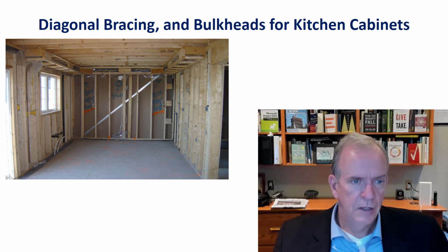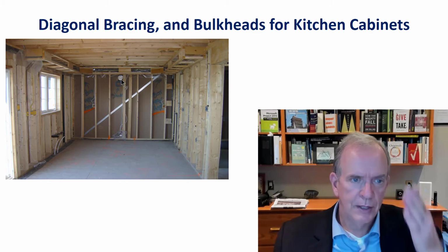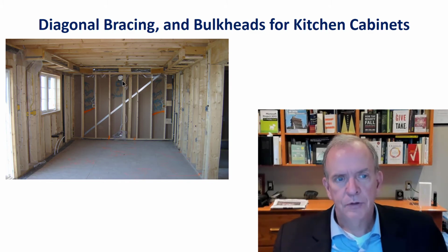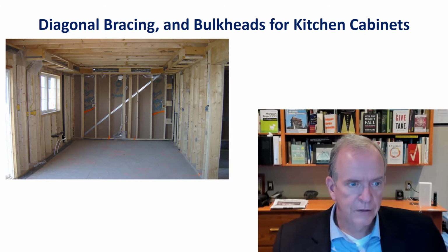You can see where the exhaust is going out for the fan. I think they have to move it. I think they put it in the wrong spot. You have to be very careful with all the measurements. If it's in the wrong spot, then maybe the cabinet is in the way. Maybe one of the gables for the cabinet, part of the cabinet is in the way, and then it's got to be moved. Much easier to move it at this stage, or better yet, put it in the right spot to begin with. You can see some of the rough-ins for the plumbing.